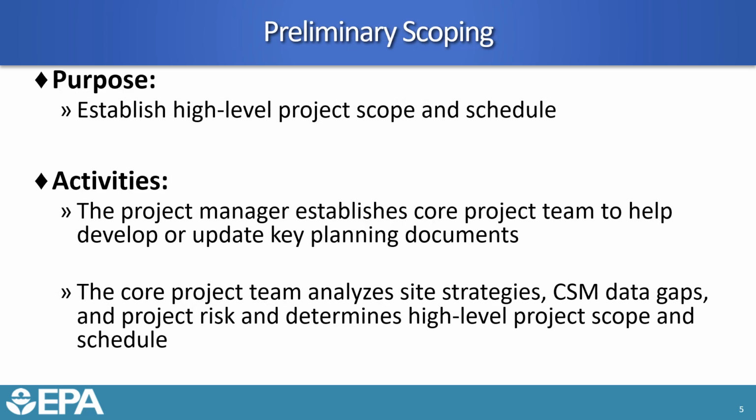The first step in our SMART scoping process will be preliminary scoping. The purpose of this is to establish a high-level project scope and schedule. What is involved is the project manager establishes a core project team to help develop and update those key planning documents, whether those documents end up being work plans, quality assurance plans, project plans,